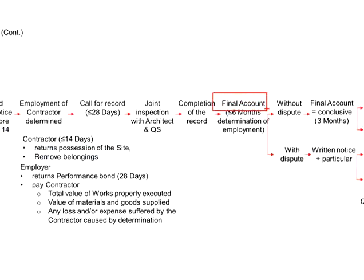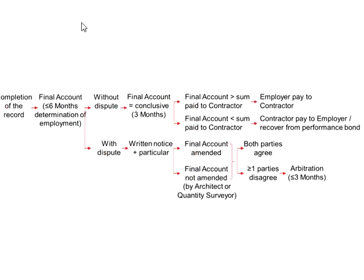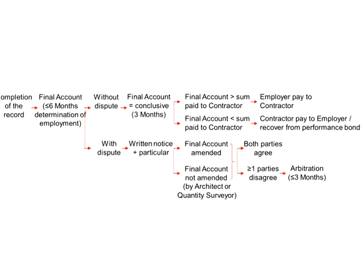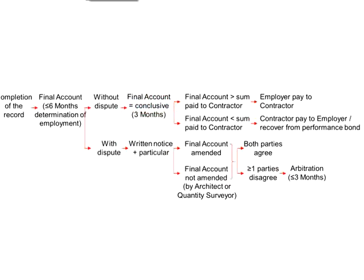Then, this final account will be disclosed to the employer, architect, and quantity surveyor. It will be up to the employer whether to trigger a dispute or not. If the employer agrees with the final account produced by the contractor, there is no dispute. And if the employer remains silent for three months, the final account is considered conclusive — deemed agreed by the employer — and the final figure shall be settled.